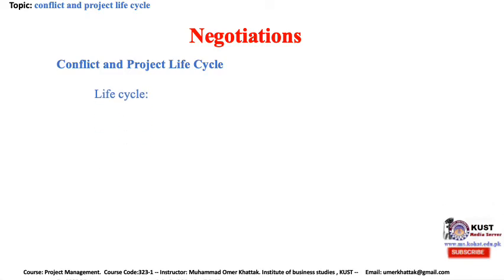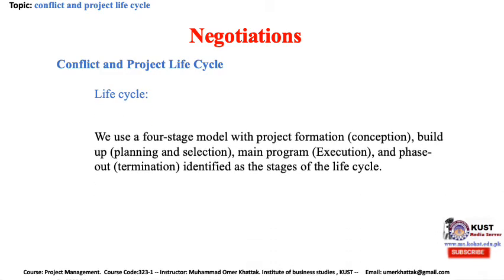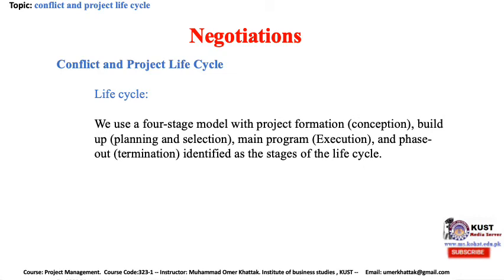Life cycle. We use a four-stage model with project formation, also called conception; build-up, called planning and selection; main program, execution; and phase out, which is also called termination, identified as the stages of the life cycle.